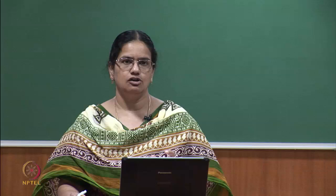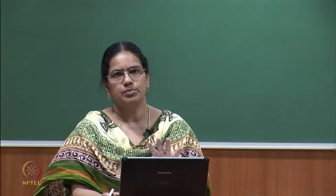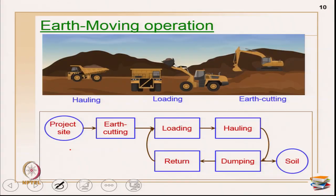Let me put the same slow-fast concept in a construction flow. I have an earth moving operation - this is the cycle flow you may remember from the first class. The activities are: loading, hauling, dumping, and return - four activities in cycle. Using rough durations from site data: loading takes 2 hours, hauling 6 hours (traveling on road), dumping 1 hour, and return 6 hours traveling on the same road. These are the assumptions: 2, 6, 1, 6.